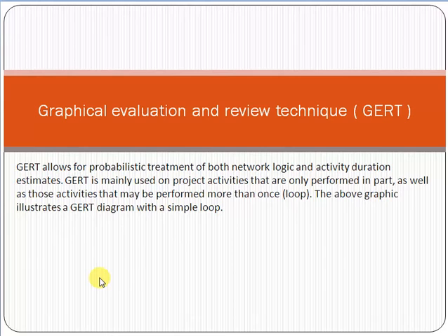GERT allows for probabilistic treatment of both network logic and activity duration estimates. GERT is mainly used on project activities that are only performed in part, as well as those activities that may be performed more than once. The above graphic illustrates a graphical diagram with a simple loop.